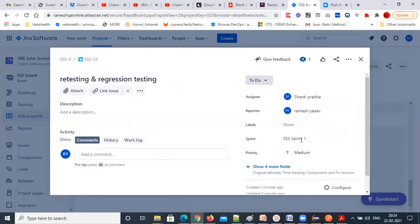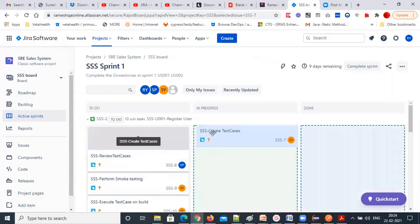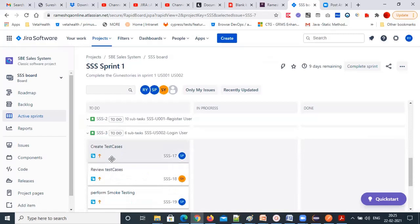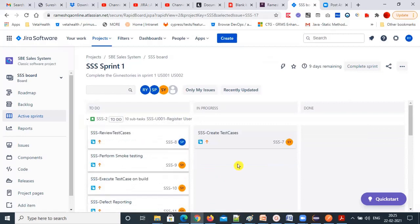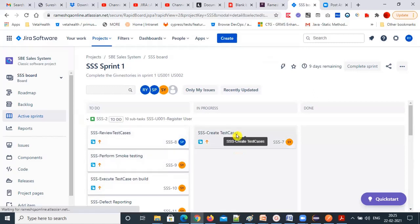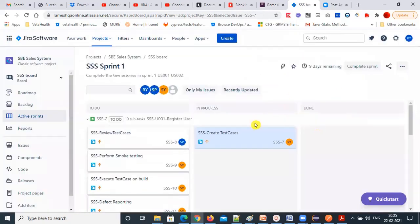All are assigned now. Assignment is done. Now you start working — tasks are in 'to-do.' Once you start working, you can put it in 'in progress' by dragging and dropping. Both tasks are now in progress. If you open the task, it will automatically show 'in progress.' The status changes from 'to-do' to 'in progress.' Once it is done, drag it to 'done' — that's it.